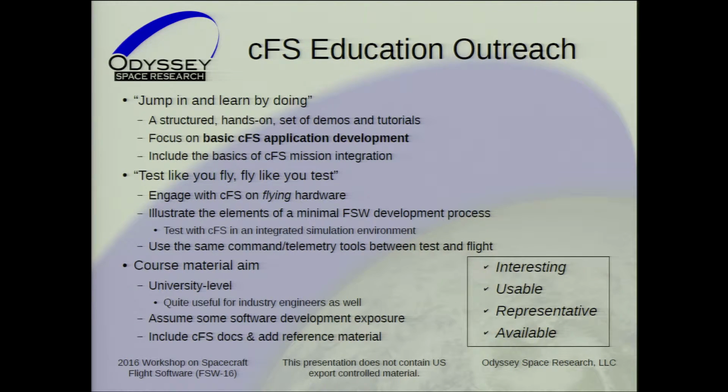For the flight software development process, space vehicles are different than drones. Drones are a few bucks. Space vehicles are a few million dollars or more. So the testing in an integrated simulation environment ends up being sometimes more critical than the flight software. It sounds weird to say that, but if you don't start thinking about testing at the very beginning and how you want to integrate it with your software process, you're really going to end up on the losing end of things later, because you're going to discover too much stuff late.